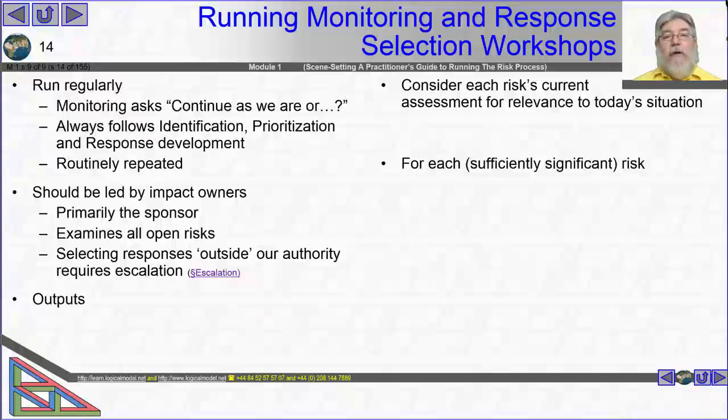And that's a very important component of the initial planning conversations, which talk about who is the point of escalation from one person to another, and how we do the escalation to somebody who's technical, which is very often called delegation, so that we can get a good solution combined with the authority to deploy it. The outputs of all of this are going to be adjusted baseline intentions, so an adjusted sprint activity. So running the routine monitoring may be a component of a daily stand-up meeting, a weekly progress meeting, or a sprint planning session where we're looking at risks that were around from the previous sprint. In total, what we're looking at is what's our risk profile, and how should it be adjusted?